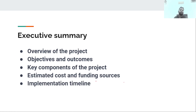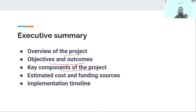Let's talk about the executive summary — the first point. We need to give an overview of the project, including the objectives and outcomes, key components, estimated cost and funding sources, and the implementation timeline.